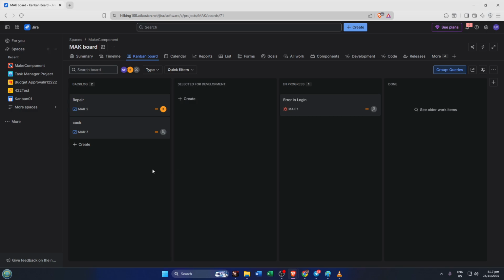First things first, the beauty of our method today revolves around using default component assignees. Now you might ask, what is that exactly? If your project uses components such as subparts or divisions of a project, Jira lets you automatically assign issues to the designated component lead when you select that component while you're creating the issue. So how does it work?